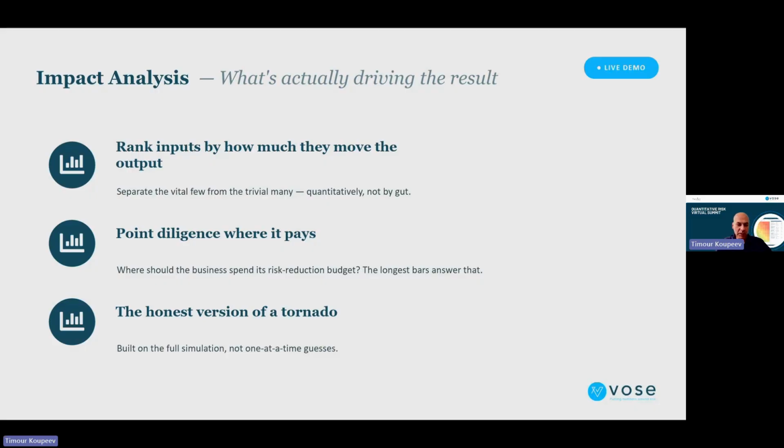So what you do is, you know what the outputs are, right? The NPV model, what you're interested in is the final NPV calculation. So you know where the output is. You go and mark the output, and then you need to think to yourself, okay, so how do I make it stochastic? Which cells do I need to mark as distributions, or to define distributions? So how do I do that? Maybe there are many of those cell candidates.